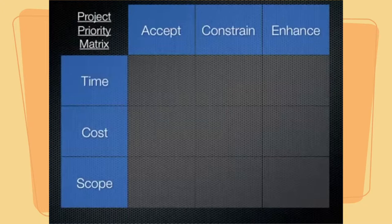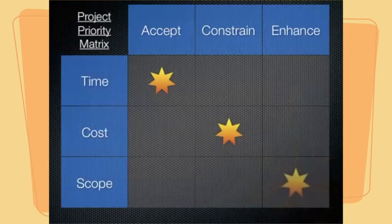Let's consider an example of a project in which the stakeholders are willing to accept a change in time, meaning a longer time to completion, but are not willing to accept changes in cost, that cost is constrained, and would like to enhance the scope if possible. In this case, the scope might be enhanced as long as it only leads to a longer time to completion, but not if it means an increase in cost.